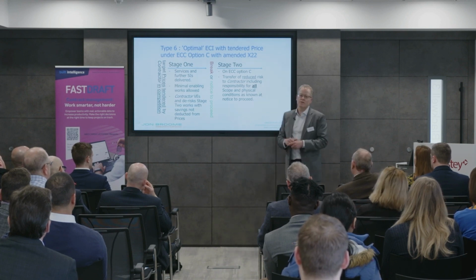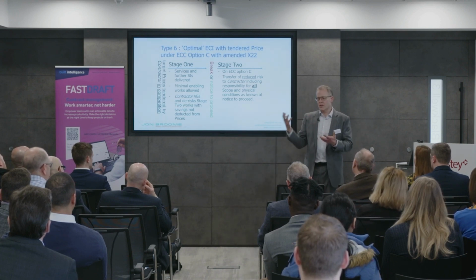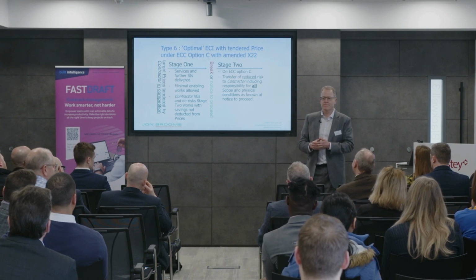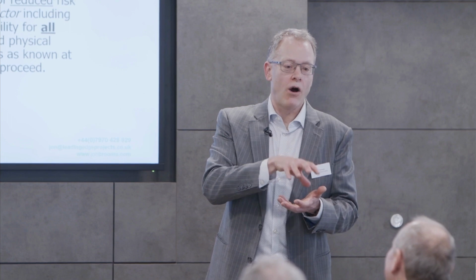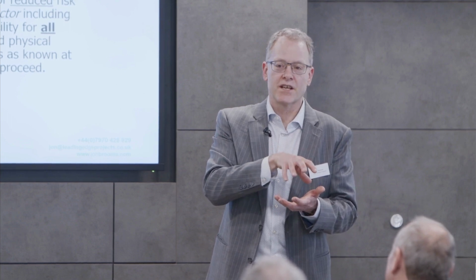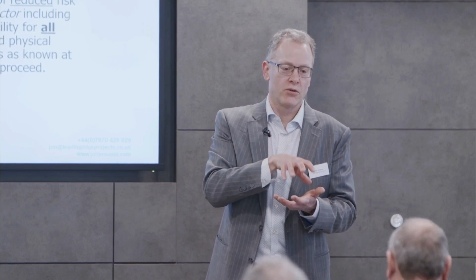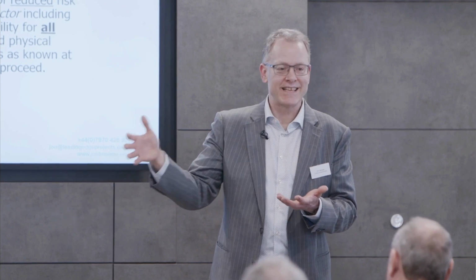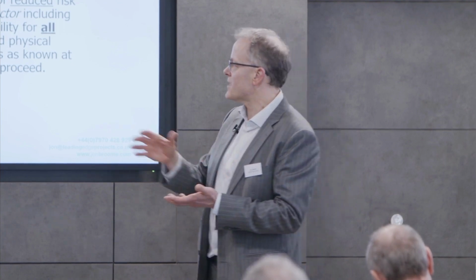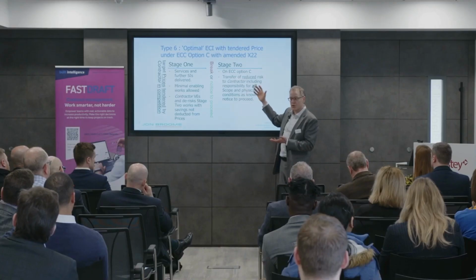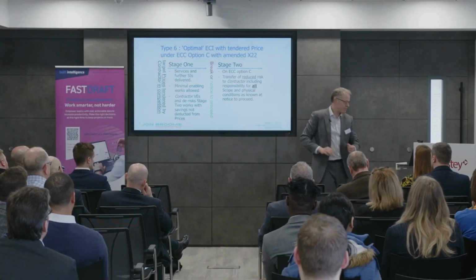And also what happened was there was a client scope, and effectively that became the contractor's scope on signing on proceedings to stage 2. So the contractor took responsibility for that because they'd had a year to look at it and develop their detailed design. So in that sense, the prices had much more certainty around it. Right, okay, I'm almost there.